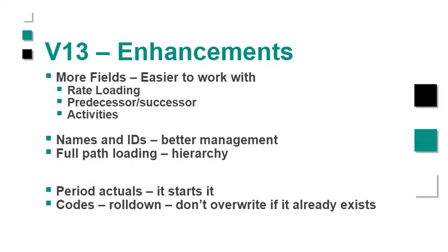And then when you're uploading actuals, okay, so this is, again, another client-driven requirement. They were taking stuff out of a different system, essentially timesheet data out of another system. They wanted to automate their loading and making sure that if we got an actual, that we started the activity.